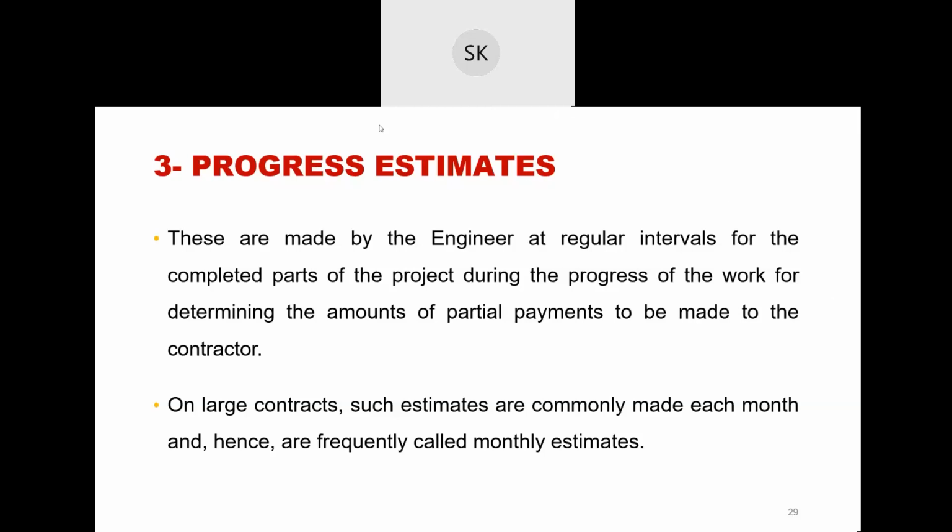Not only in a government project, in private projects also. Private companies don't construct by their own, they hire contractors. The contractors do the work and they can submit an estimate of a large amount, any lump sum estimate. It is the engineer's duty in the company to cross check. For cross checking, he makes his own estimate and checks with the contractor's whether it matches or not.